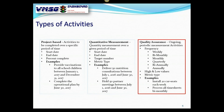The third type — quality assurance — is the least used but most automated. This is like the car seat example with a weekly frequency. Every time Andrea updates the number of car seats installed, it automatically bumps the dates to the next week, sets the high and low values for the red and green lines on the chart, and determines where the traffic light is set. There are lots of choices for activity types — in the last couple of years we haven't had a request to add a new activity type, so we think it's well covered.